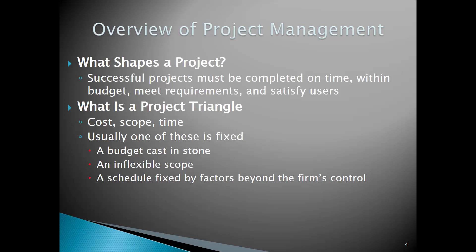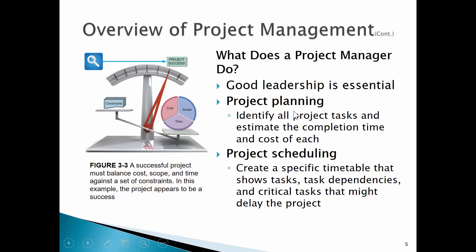The project triangle - cost, scope, and time. Usually one of these is fixed. The budget can be cast in stone, the scope can be cast in stone, or the schedule. We have to fix something. We can't have just a bunch of variables as we do these projects.